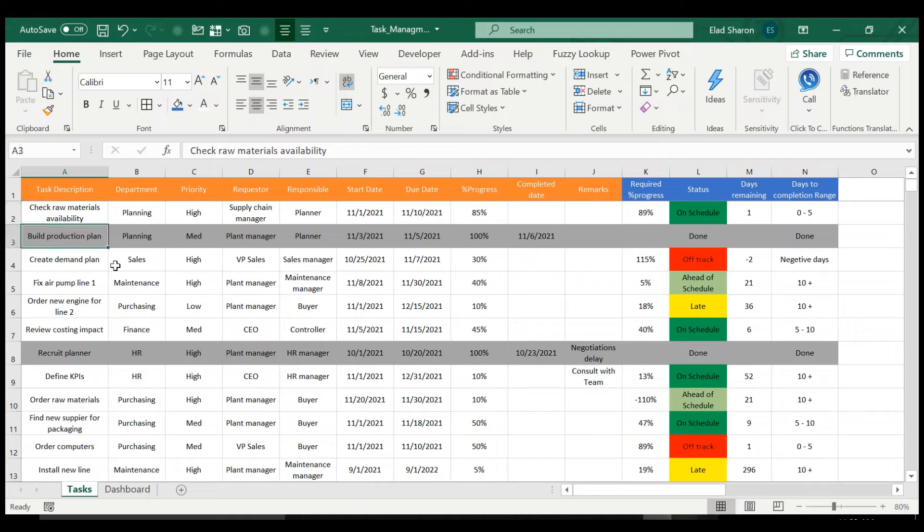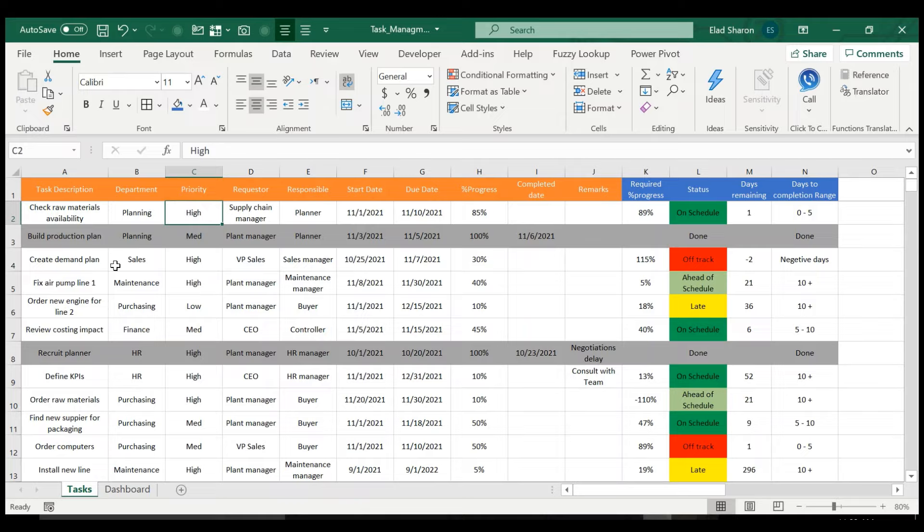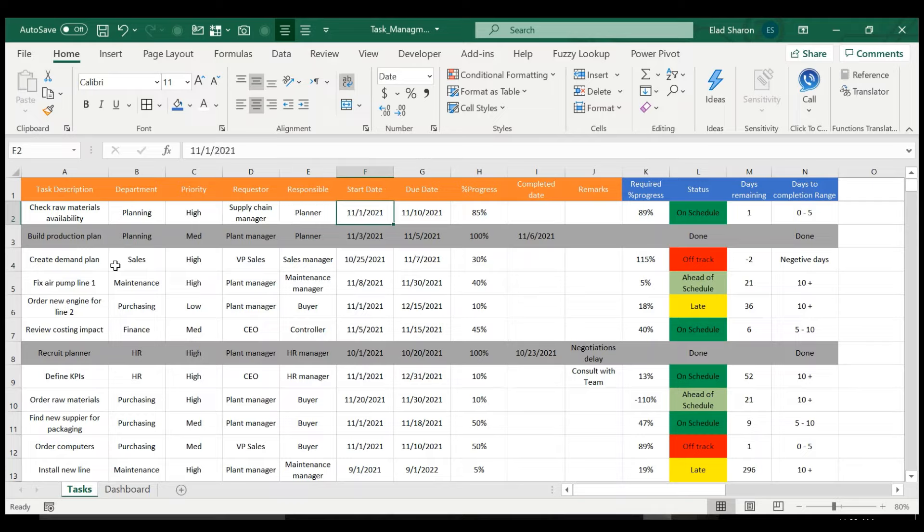So you have the description, and you have a department, for example. And of course, everything I put here is something that you can build whatever is best for your needs. So I have here the department that's relevant for the task priority, who is the requester of the tasks, and who is responsible to deliver this task. What's the start date? What's the due date? And what's the progress? For example, 85% is completed.